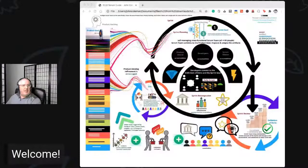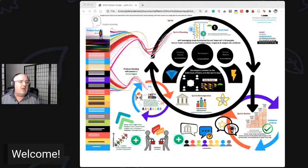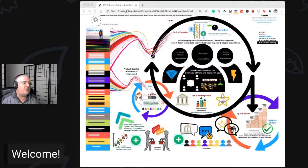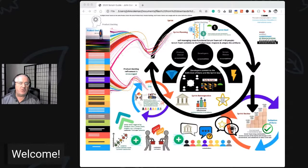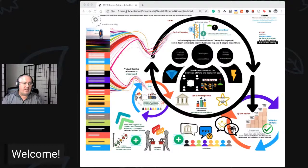The 2020 Scrum Guide is something I made an interpretation of a few months ago, and I came up with this visualization. You can see here on the top left corner the product goals. New in the 2020 Guide is the commitment of the product goal through the product backlog. The idea is that there's one active product goal — you could have some other ones that aren't active yet.